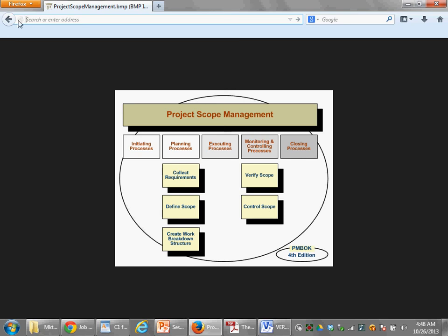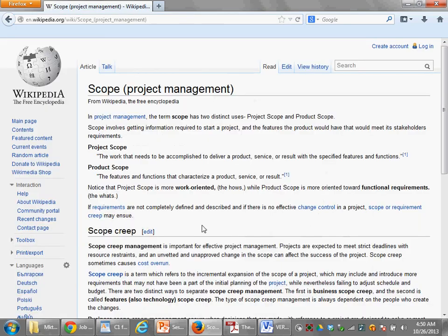In general, I'm not a big fan of wiki, but there is something I want to talk about regarding scope. One is what we will do, and second is how much involved we will be. For example, let's say your job is to provide a good sales management system. You can talk in terms of processes, systems and interfaces, but you might also say that we will not get involved in the recruitment of the resources. Let's say a new developer is needed, then recruiting the developer will be your responsibility. You can talk about the scope like this.